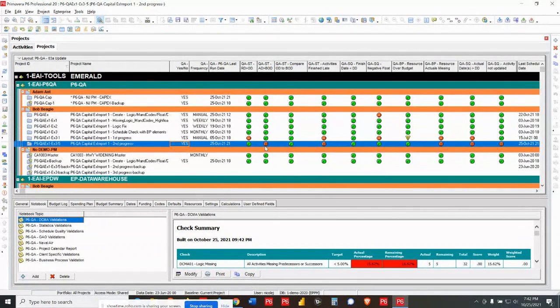Okay. So this is a hugely important one as you start to progress. You want to see about your duration. Is the actual duration going longer than the budgeted original duration? Do I have any activities that are finishing late? Do I have any activities that are missing resource updates? So they're in progress, but there's no actual hours. That's important if you're using earned value or doing any of that kind of analysis, because maybe an update got missed. Okay, so these are really important ones. Are my actual dates after my data date? Okay, because that's not normal. There might be an odd one where you might accept that, but it's not normal. So it's generally a bust on the updating process. So we're taking a look at all of these different kinds of metrics.